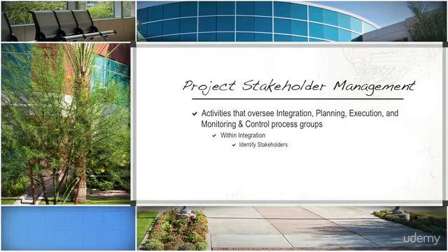The Identify Stakeholders process lasts from project initiation until the very last moments of the project's existence. It is arguably the most repeated process of all the processes. Typically, it repeats most often and has more emphasis at the initiation of new projects or phases. Hence, the Identify Stakeholders process is classified within the initiating process group.